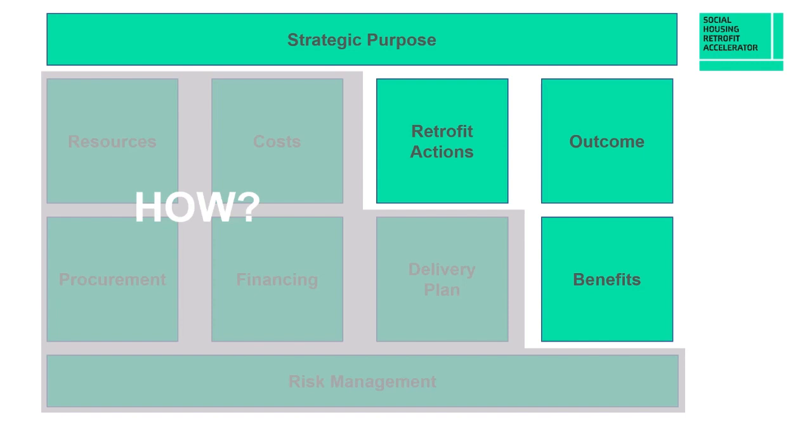And another useful thing you can do is create a one-page overview of the project, putting the key points, a few sentences, a few words in each of the boxes to tell you where you're up to. And you can color code the boxes if you like, red, amber, or green. Where are we secure? Where are we on target? Where are we having problems? Where might we need to make some changes?